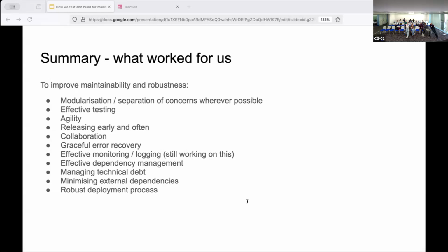So we use Kanban. It really does help us, allows us to take more time and improves the quality of our work. And it also allows us to make technical debt part of our backlog. And we actually have a weekly technical debt stand-up. We also use retrospectives to work through our problems and decide on solutions. And this is a really important one: Agile should be agile. So be flexible with your processes and don't tie yourself to particular frameworks or artifacts which don't actually work. We try to release early and often.